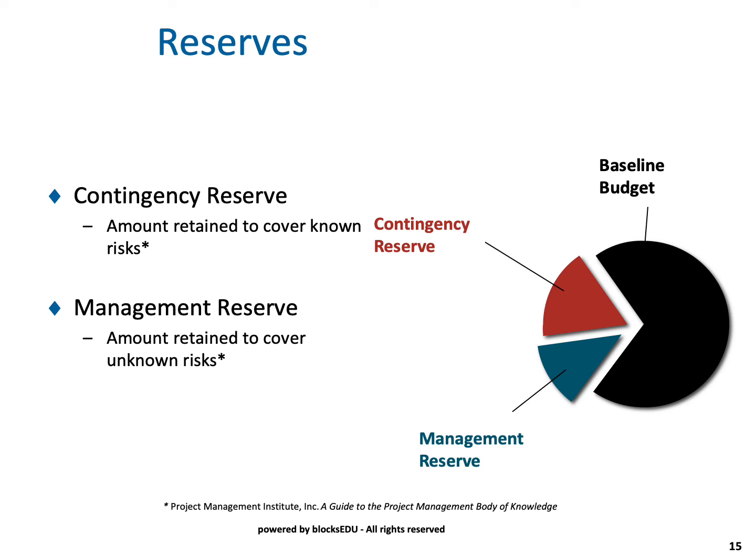The challenge that comes with that is, for example, if you have $1 million budget and you turn around and you have 10%, you now have $1,100,000 allocated to that project. Now, project managers are pretty clever. They'll go spend the $1.1 million, even though they may not need it. May not need it for things that the contingency is aimed to overcome. The better way to look at this is actually coming up with a reserve.